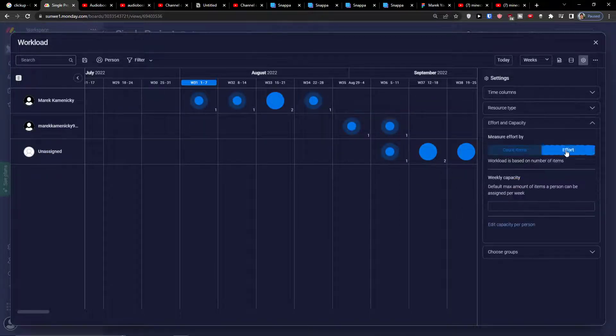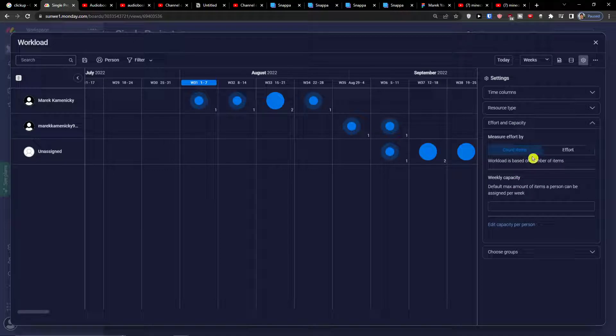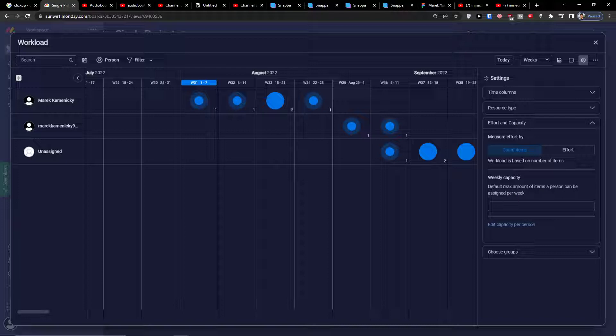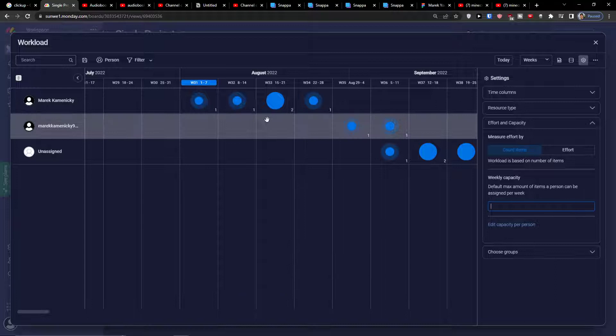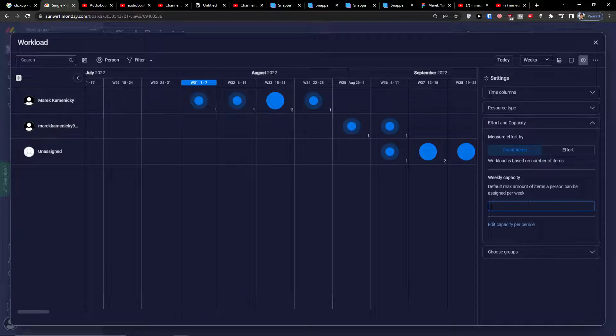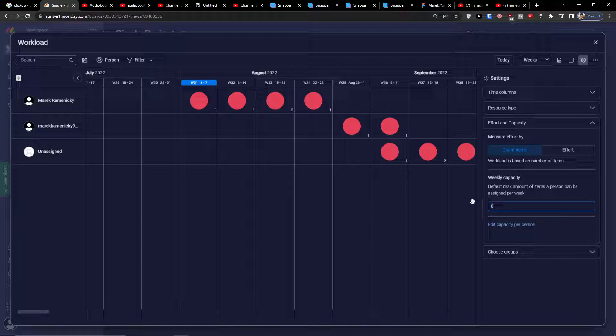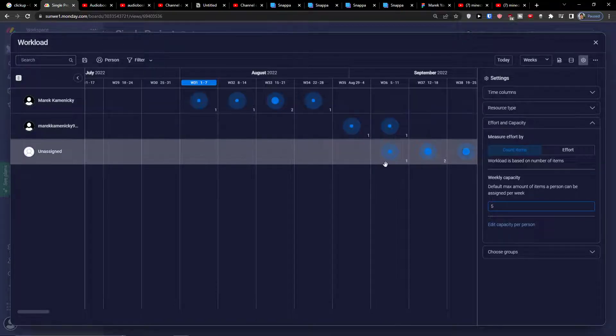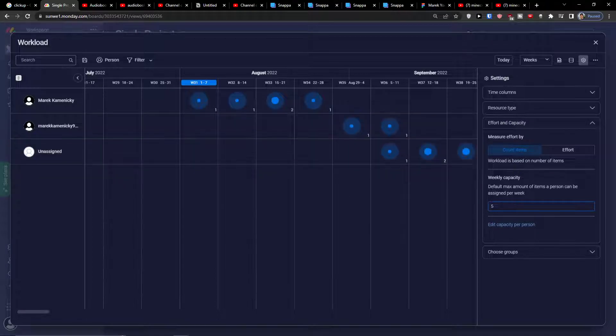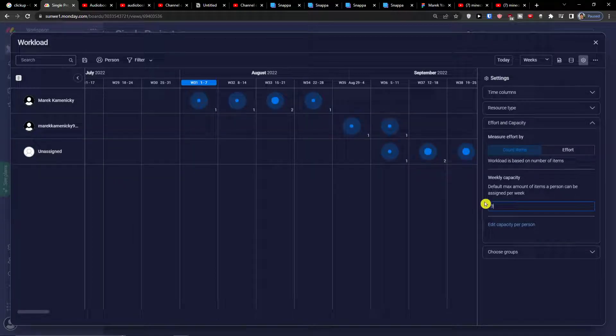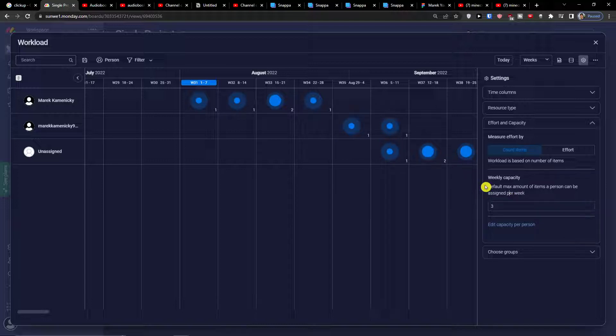Effort and capacity: measure effort by workload is based on number of items, weekly capacity. Let's say default max amount of items a person can be assigned per week. So let's say this is going to be one, then everything is going to be red. Let's say five. In the moment when you see they can get more items assigned, but in the moment when you're going to change the weekly capacity for the workload, everything is going to change right. This is really important to say.